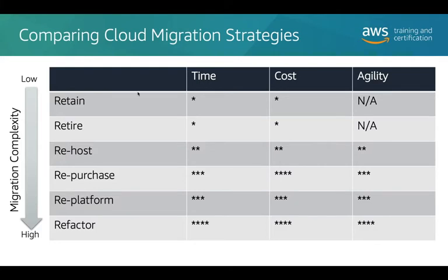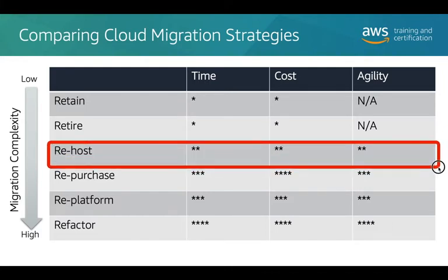If you compare that, for example, with a simple lift and shift approach, such as a rehosting there, it will be faster to achieve. It will cost less for the actual migration. However, you're not going to get all of the benefits that you would from a complete refactoring exercise. So for each individual workload that we're dealing with, we need to understand what is the most appropriate pattern to use.